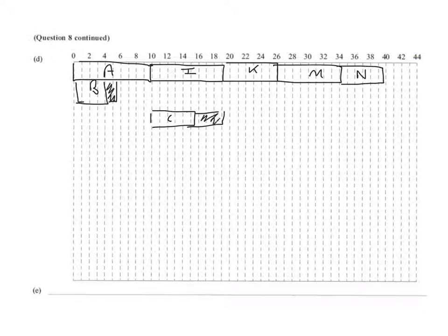So I draw that in like that. So notice that activity C, the earliest start time is 10 days. The length of the activity is 5. My diagram's not terribly good there. Should be at 15. And the latest finish time is after 19 days. So that goes up to 19.